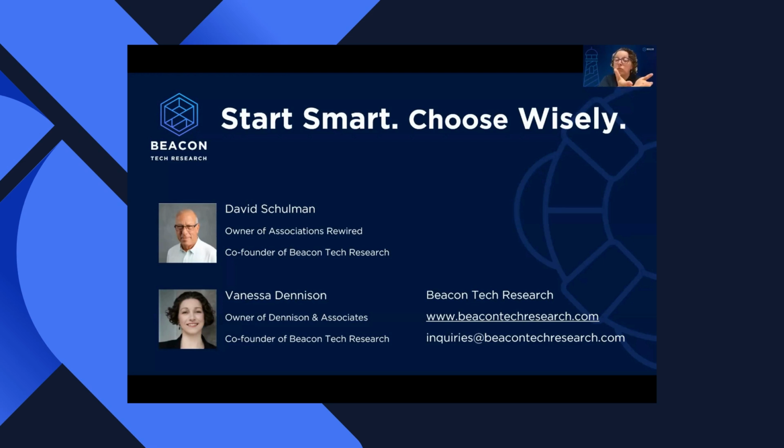They'll turn it over to you, they'll train you, and then they say, you test. But you are going to have to come up with a plan for that or work with a consultant. And again, more than one person testing any given thing, because one set of eyes and hands on a test is about as good as the internal testing that the software company does. The more, the merrier. And I think we're at time.